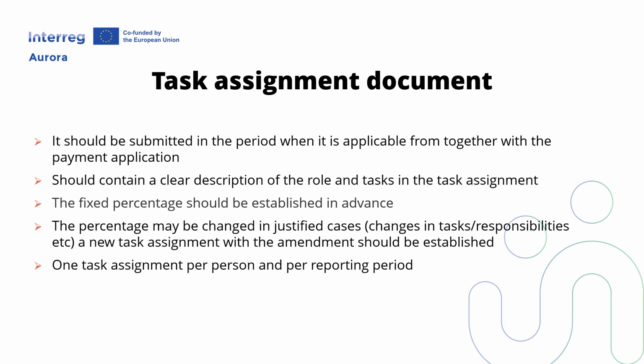Some notes about the task assignment document. It should be submitted together with the payment application in the period when it is applicable from. You don't send it to your program officer, only together with the payment application. It is important to have a clear description of each person's role, tasks, and responsibilities in the task assignments. The level of detail for the tasks should be proportionate to the involvement in the project.